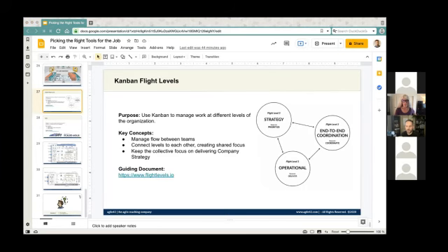Yeah, the absolute key is that you actually have to have the team build a product end to end once, or at least a subset, so that there's absolute trust that people can estimate their time, or that people understand that they have to multiply by 3.1 on estimates for the same person. Then it starts to click. But thank you for your talk. I think Vishal had something.